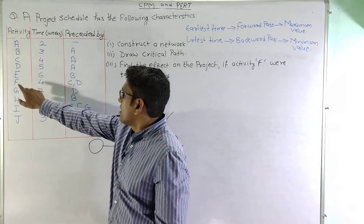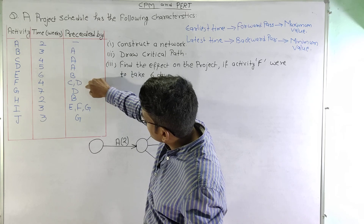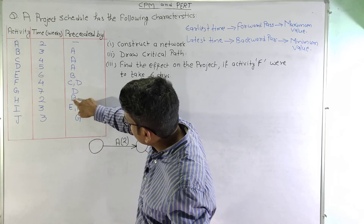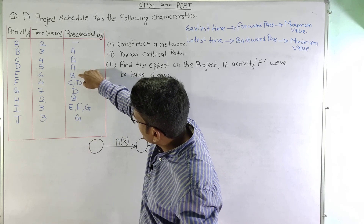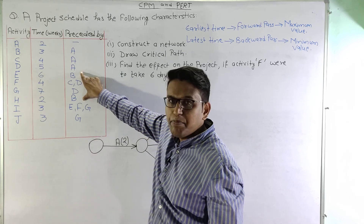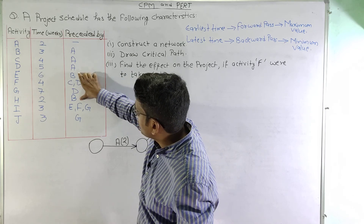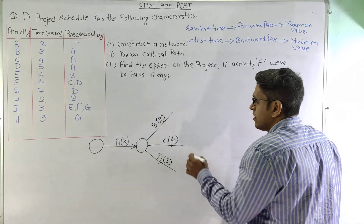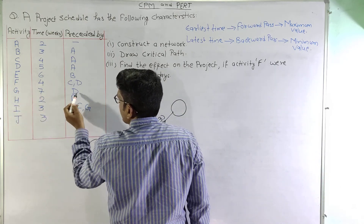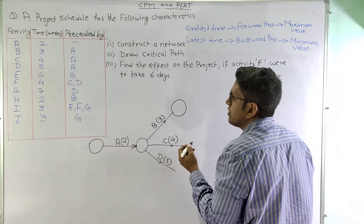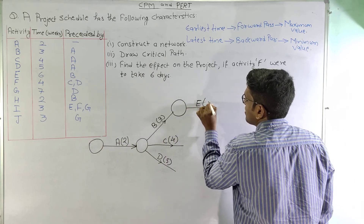Moving on to activity E, activity E is preceded by activity B. As we look further, we can see that there is another activity also preceded by B only. Since two activities are preceded by B only and B is not in combination with any other activity, we can directly end activity B and start activities E and H from that node. Activity E takes 6 weeks.